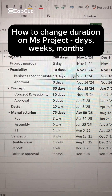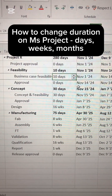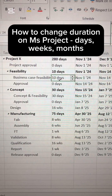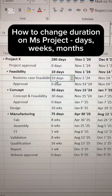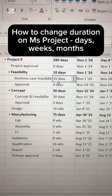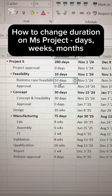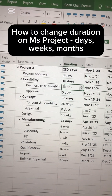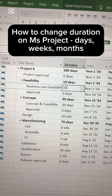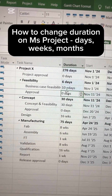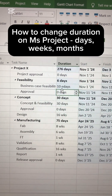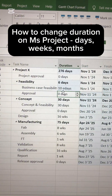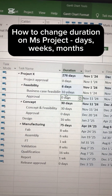Here's something that can help you when you're working your timeline on MS Project. Here you see the duration of the task. When you put 10 days, it's 10 working days. If you want to change this to elapsed days, you can just put 10 and change it to 'ed'. That means that MS Project, instead of only considering the working days, also will consider the weekends.